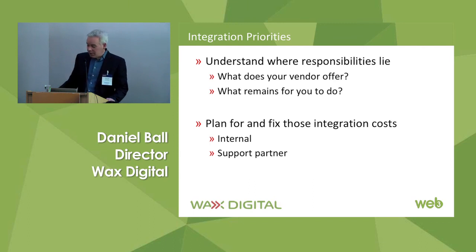We're currently working right now, in fact, with a client in London. It's not the first time, I'm sure it won't be the last time, but they assume clearly that we can integrate with their ERP system, which we can do, but also that we will do the work within their ERP system to actually enable that integration locally. That is not the case. That is not our remit. It is your finance system. You need to make sure that you are resourcing the integration on your side of things.